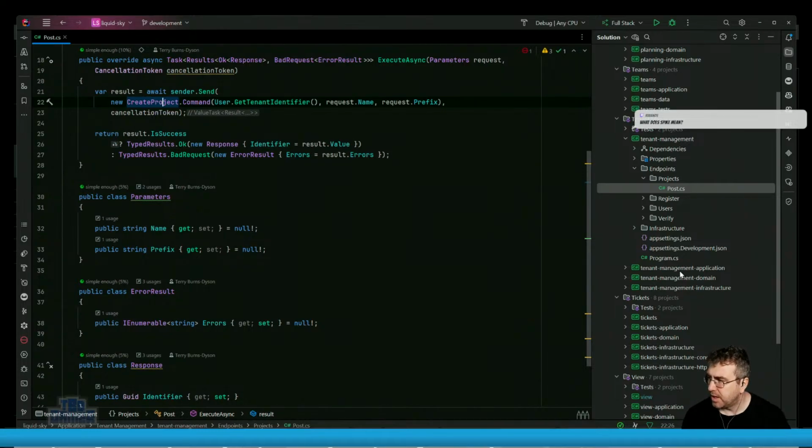What does spike mean? A spike, depending on how a company defines it, there's some difference in what people expect of a spike. A spike should be a very short amount of work to identify any additional requirements or problems for a piece of work that's coming, right? So it's preparation, groundwork sort of stuff. A spike might be identify how you might authenticate with this third-party service, right? So basically go off and read the docs and add into the actual story or gather a documentation together to say, here's how you actually go about this piece. We know we need to do it, but we don't know how to do it.